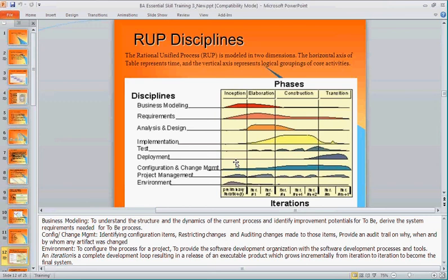There must be a process for it that must be clarified before you begin the project. And hence you have the configuration and change management process component right here in inception. You must define it early on. Where will all the change requests be documented? Where will the configurations, the different versions of the documents, be stored? How will the versioning work? Are you clear?